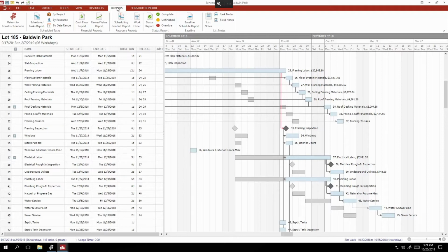So now that this baseline is identifying to us where our tasks have come off track, we have this excellent tool that allows us to come back in and find the right course. You'll also find that Jordan is navigating his way to a baseline schedule report as well. This takes advantage of the fact that we've set this baseline, and it identifies how far we've slipped in that schedule and which tasks we need to focus on.